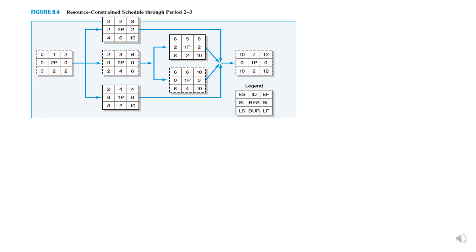In this exercise, the early start, early finish, late start and late finish has been given. You can refer to the legend here indicating the information of the activity and you can also easily determine the critical path which indicates a zero for the slacks. So in this case, the CPM is 1, 3, 6 and 7.